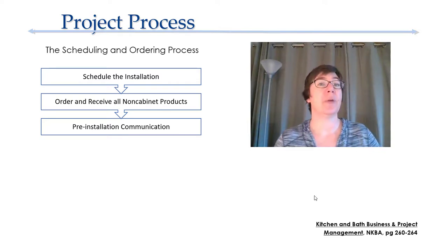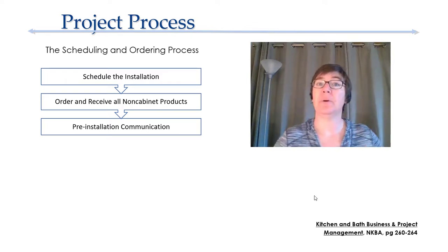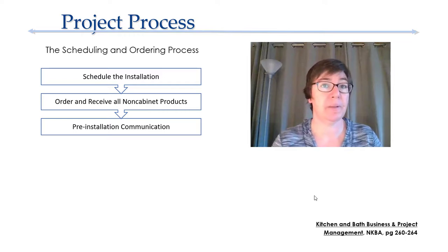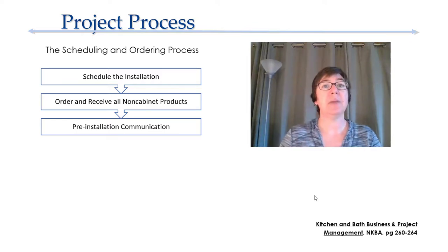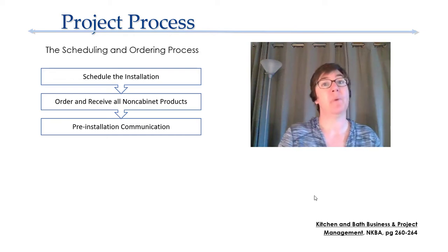Next, you're going to order and receive all your non-cabinet products. Now, your textbook is very specific about making sure that everything arrives on the job site before you start your project.